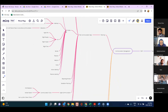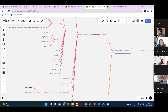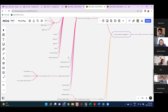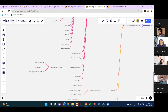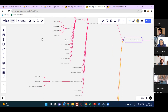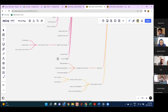Under communication management, in planning we have planned communication management. We define meeting types: formal or informal, written formal, verbal formal, informal written, and informal verbal. Note that per PMI, emails are unofficial. We have seven C's of communication: complete, clarity, concise, correct, courtesy, concrete, and consideration. Three modes of communication: push, pull, and interactive. Email and text are push; people collect information via pull; interactive is between two to three people interacting directly.